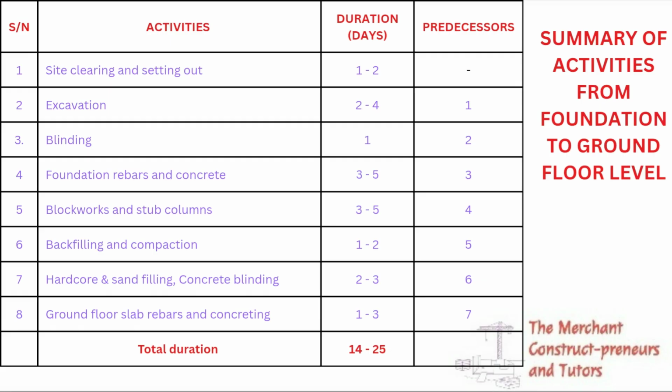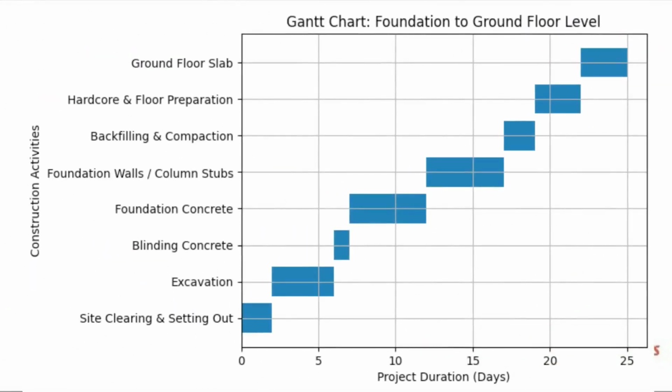So there are activities that must end before the next one starts. From the explanation, each of these activities has other small activities inside it that work concurrently. Like your reinforcements, it is not when everything has been settled that you start cutting and bending your reinforcement into shape. The laying will come after everything has been set, but you need to prepare them beforehand, cut into shape and all the rest, right?